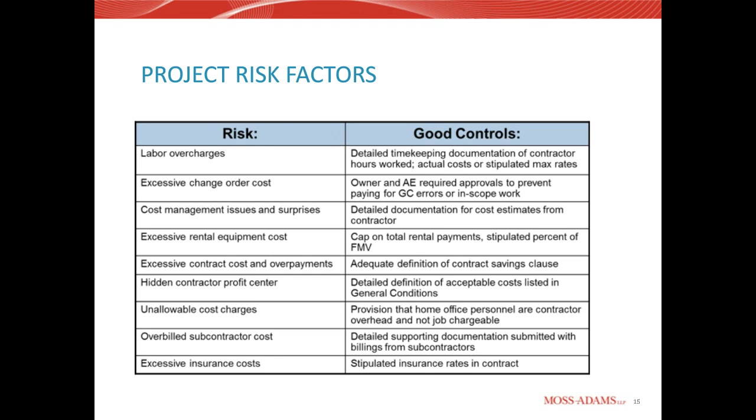It's very important as an owner to have controls in place where you know what change order costs are coming up and what your potential exposure is, and that they comply with the contract language. So for example, some controls around avoiding excessive change order costs. Owner meetings are huge. Addressing all potential claims in owners meetings. A lot of times owners like to have meetings, whether it's on a weekly, bi-weekly, or monthly basis. They're critical to address any potential upcoming changes. The quicker you can get out in front of those changes, it usually lessens the total dollar impact.